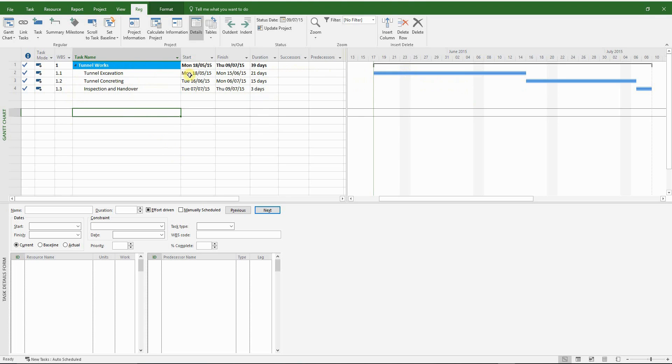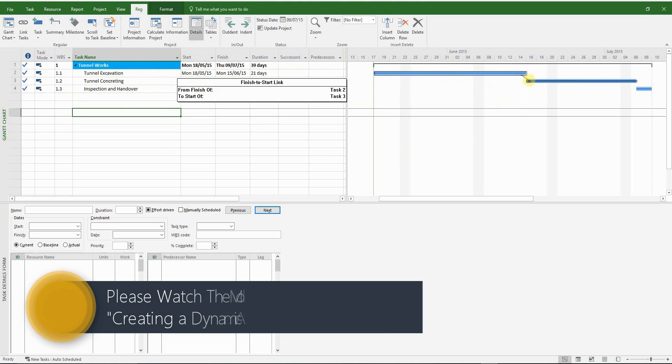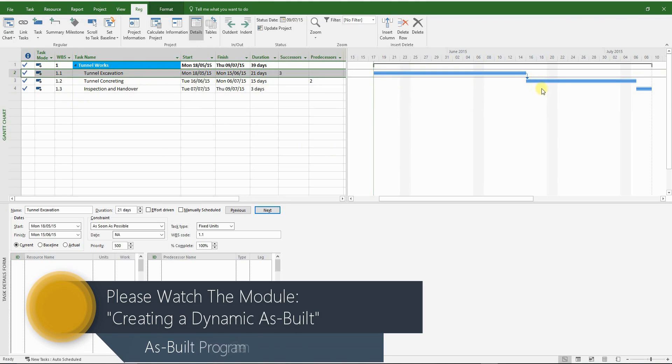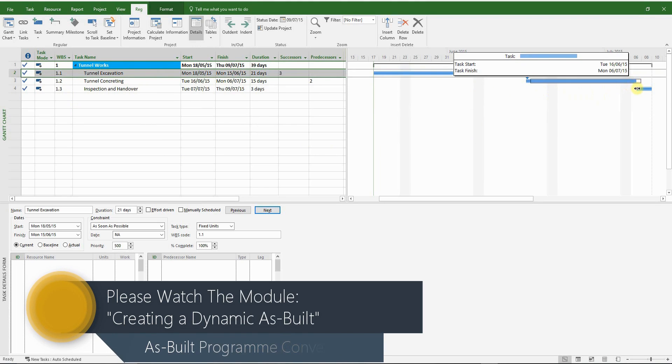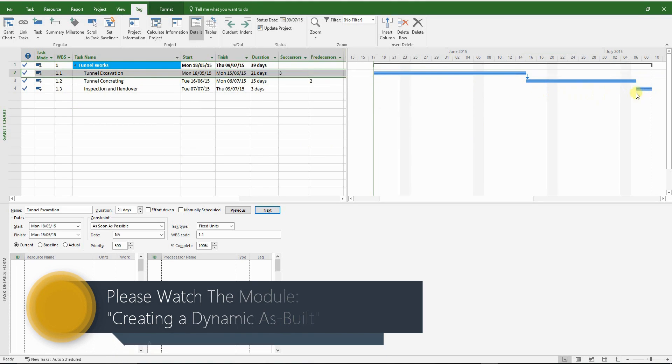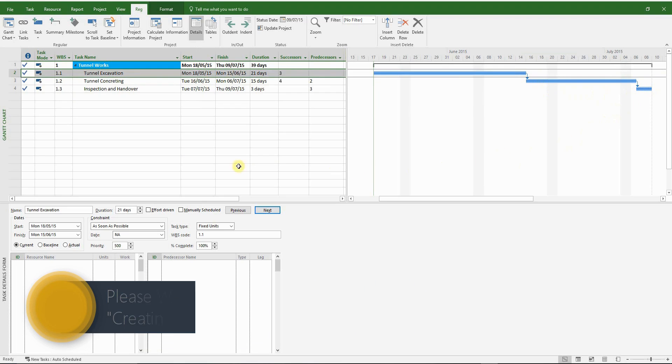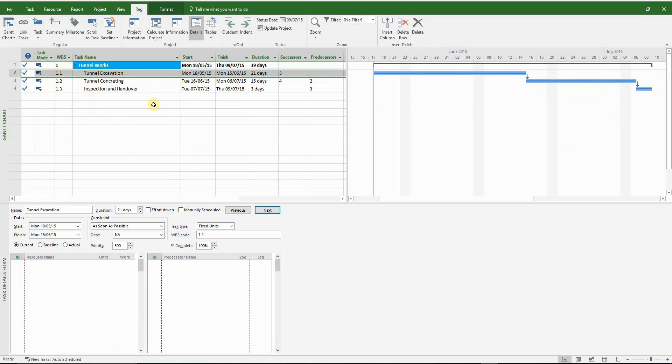So what you need to do when you receive an as-built program is you have to make it dynamic. So what that means is you will have to start introducing logical links between the activities and remove the actual start and finish dates.